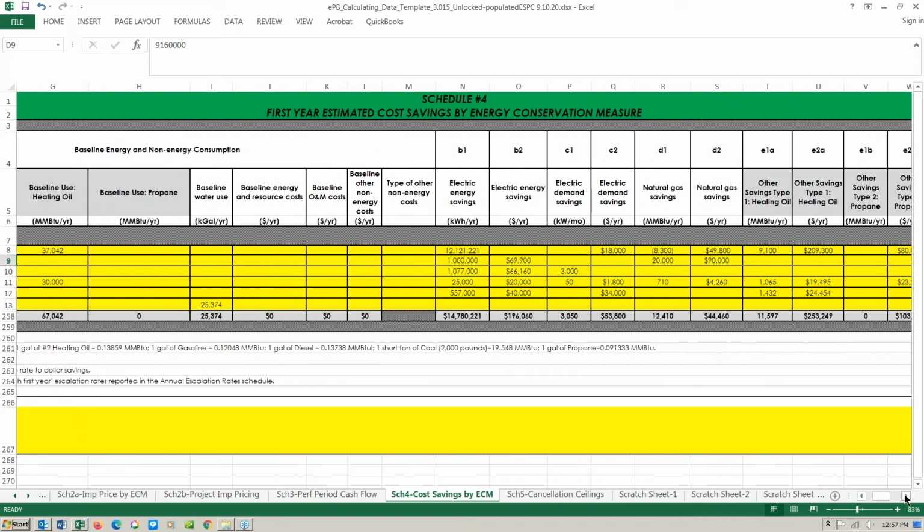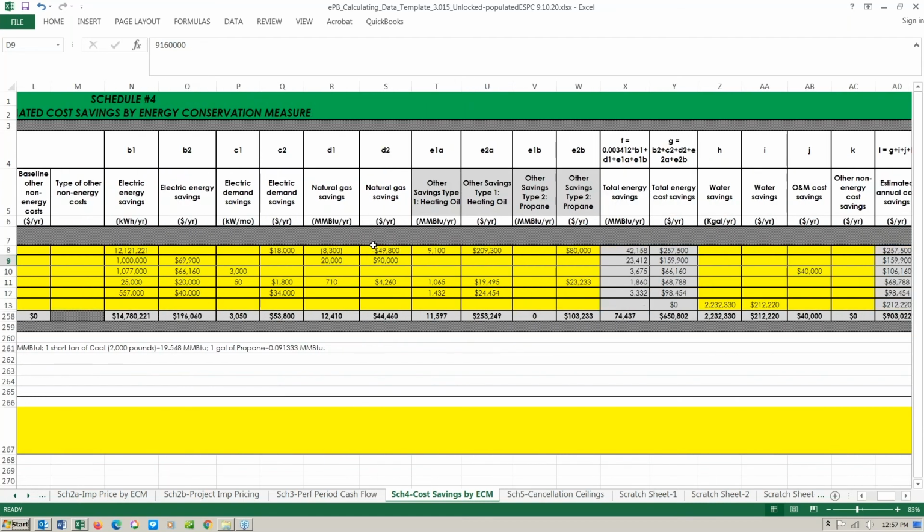Here are now the baseline savings over here, which I'm getting to sooner or later. So over here now, we're into the savings side of things, where we have electric energy savings in the units, and then those unit savings are converted to the dollar savings based on the baseline utility rates that have been disclosed and mutually agreed to between the ESCO and the owner.